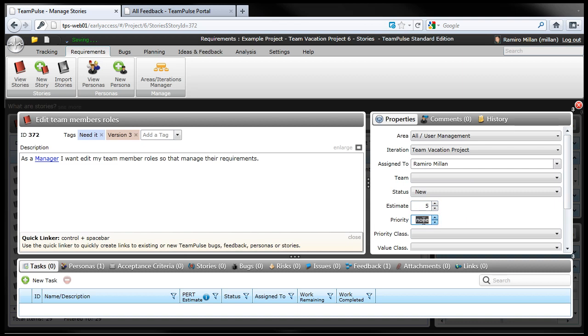And from the priorities perspective, we can specify again any number. My recommendation has always been just add 1,000 to it once you begin. Make it the lowest of your items, or 10, or whatever that number is, but make sure it's the lowest. And then from there, update the priorities.